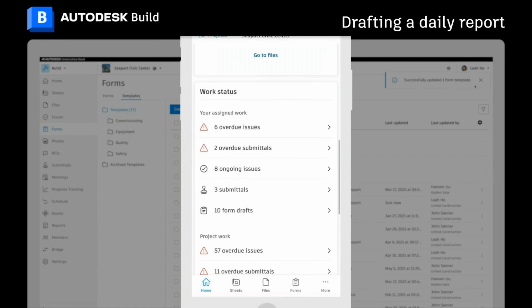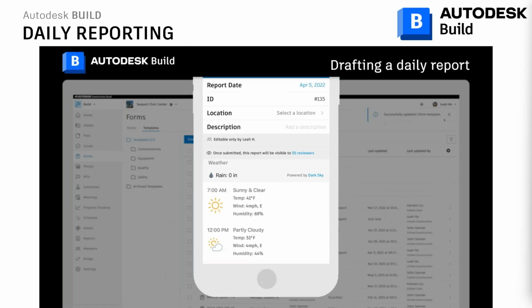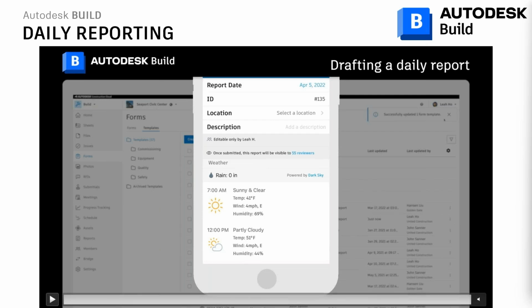All of these other things, as you can see here, can also be done on the mobile device. And the difference with this is if I'm doing my daily diary or my daily site report on the mobile device, there's an auditable track record, and everyone who's not in the site office can see it because it is live and immediately accessible.